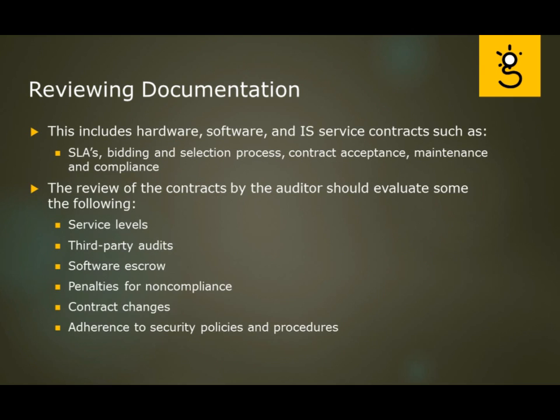We also want to look at your contractual commitments. Now, this could include your contractual commitments for hardware, software, IS service contracts. Things like your SLAs, so, service level agreements. If I buy a new server from a vendor and the server dies, it has a hardware failure 2 months into its lifespan, certainly that's probably not in line with what we expected with the mean time to repair and the mean time between failures. And so you're going to look at the agreement and say, well, what does it say about this? Do they have anything contractually that they're going to do, like replace the server?